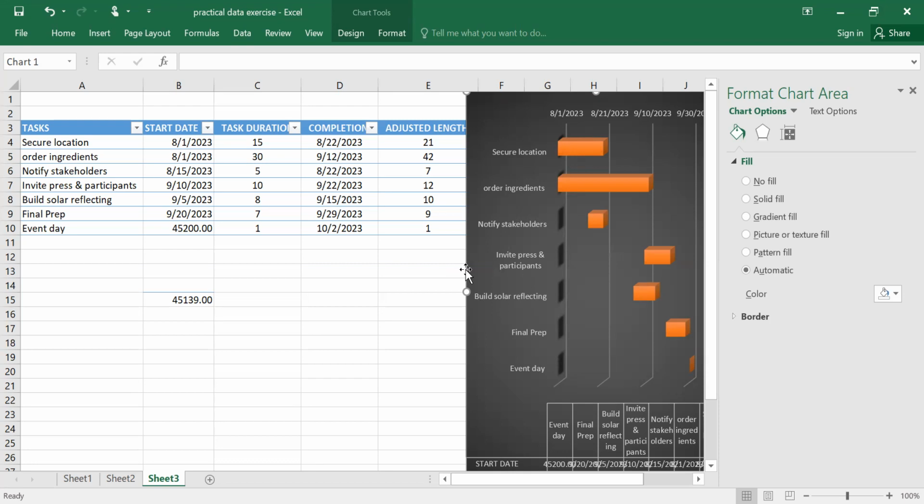And then in between, we decided that we want to be more conscious that we are not working over the weekends. What we have simply done is that the weekends and perhaps any holiday in between, we don't factor them in. And that will require us to do what we call adjusting the length of duration. Sometimes it requires us to behave that way, especially when we are doing our Gantt charts.